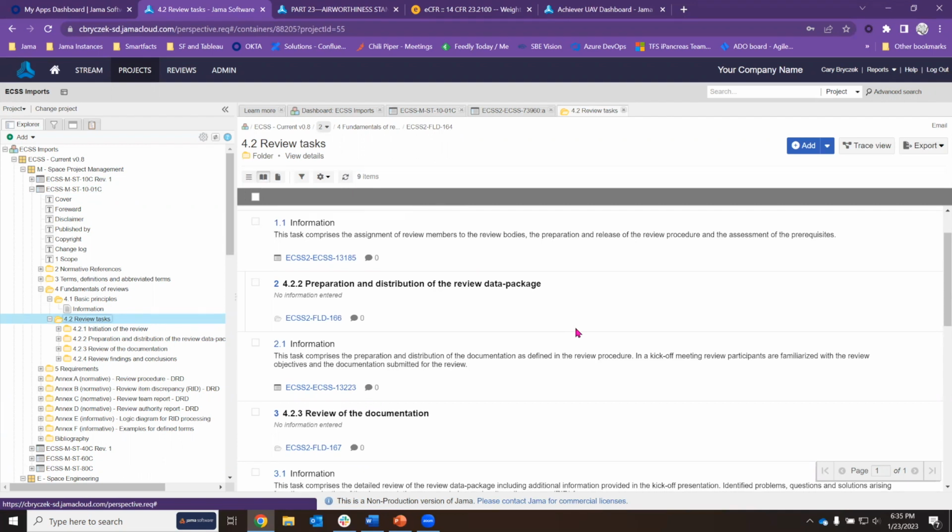Yeah, for example, the requirements that would be in a statement of work would be on the supplier, both activities and deliverables, whereas the technical requirements would be in a separate set of design input system requirements on the system itself. I got it. Possibly attached to a process specification or the like.